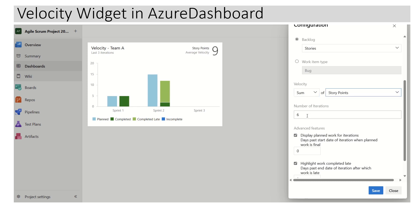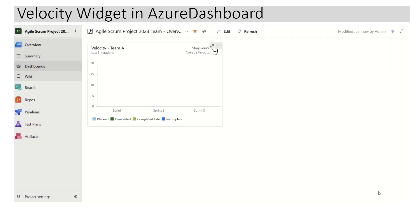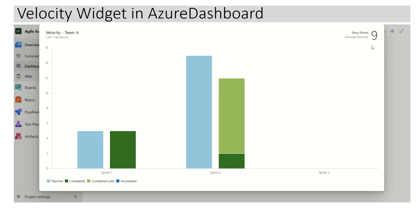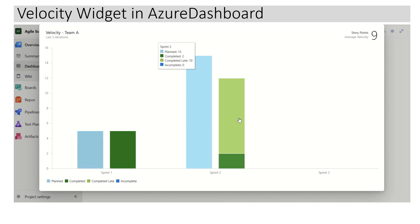The default number of iterations is 6, even though we do not have 6 iterations in this current setup, but we will keep it as 6 iterations. If I simply click on Save, we can see the numbers have changed. Now it is showing that for this particular team the average velocity is 9 story points — meaning this team is able to complete 9 story points of work in a given iteration. In Sprint 1 the team completed 5 story points, and in Sprint 2 the team completed 12 story points. There is also something marked as 'completed late'.